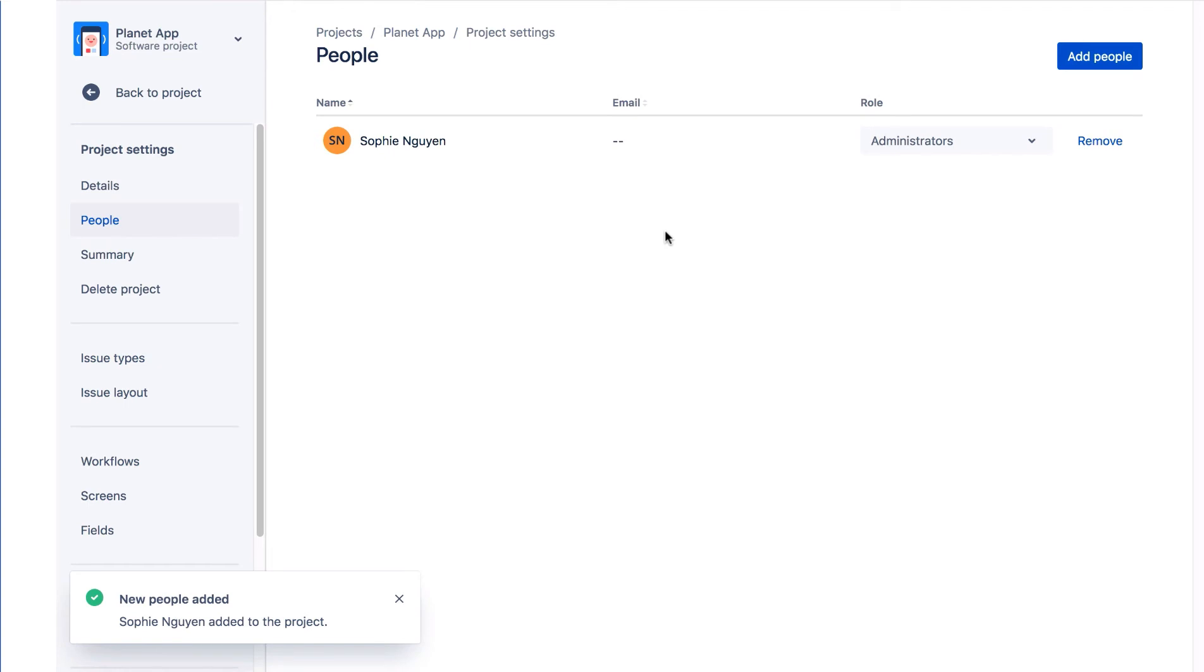She cannot however edit the project schemes. Only the JIRA Administrator can do that. Managing project role membership is probably the most important responsibility of a project administrator.